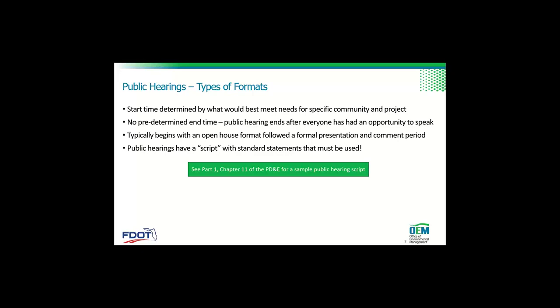And then finally, public hearings have a script with standard statements that must be used, including Title VI language. So make sure that you are looking at that Chapter 11, being very clear on what's required in a public meeting or public hearing, and that you're using the appropriate scripts that are required.